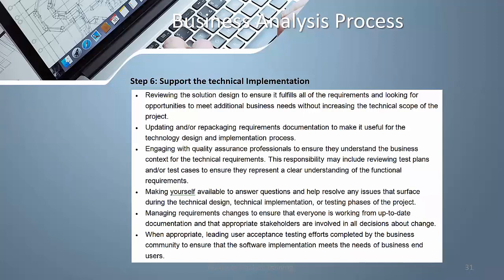You manage changes. Now, the customer can come back to you saying that no, I need a change. The process that we discussed got changed. Okay, so you manage the change. So you'll ask them, right? Instead of directly giving it to the technical team, you'll make sure first that it's not going to have a major impact on the whole process. When somebody asks for a change, you want to know what kind of impact it will have on the business, right? That you measure. And if you see that it has almost no impact, that's when you go ahead and accept the change. If there's an impact, you want to warn them. So these are the impacts.